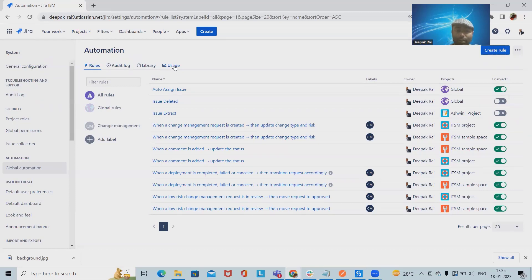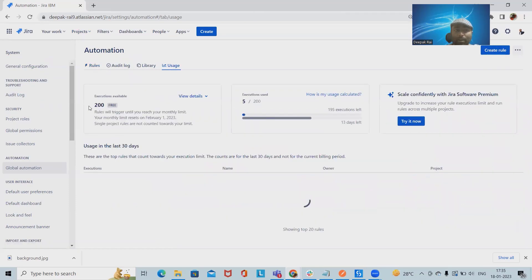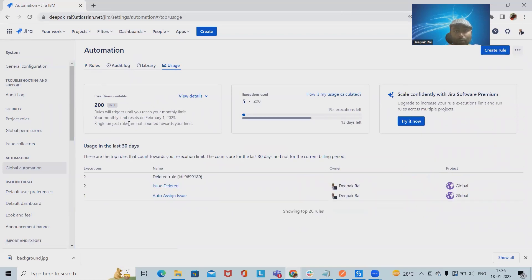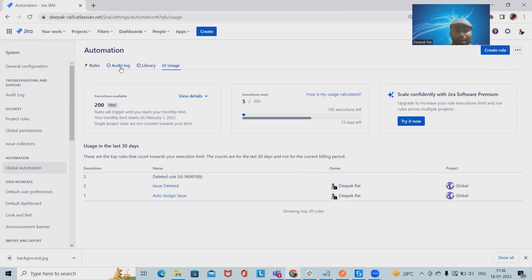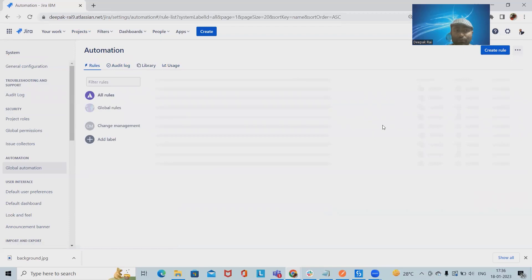or if we are using the free version, that will allow us only 200 executions in a month. From an execution point of view, if we are exceeding more than 200, we can opt for additional executions which is available inside Jira. We can also save the audit log of whatever execution has been done.